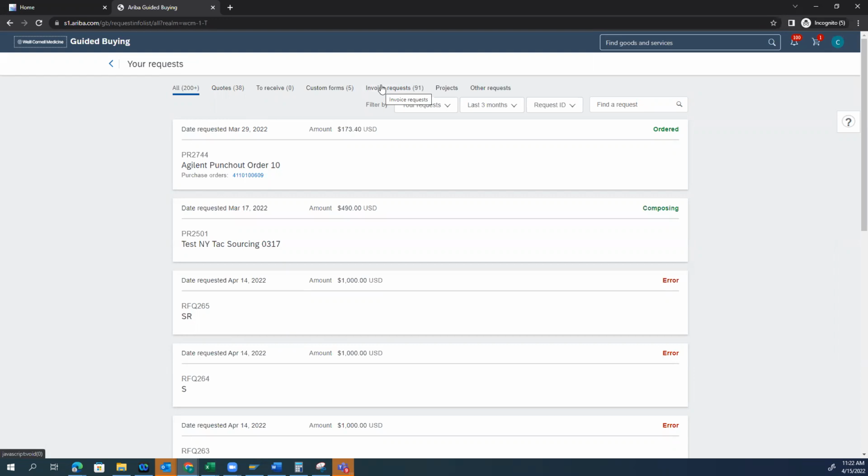I think we heard some requirements that if you place a professional services order, when the invoice comes in, you do not want AP to pay the invoice without the department actually validating or verifying that the work was completed, right? So there is a way we can request, at the time of requisition creation, whether you want to review the invoice before AP pays the vendor.